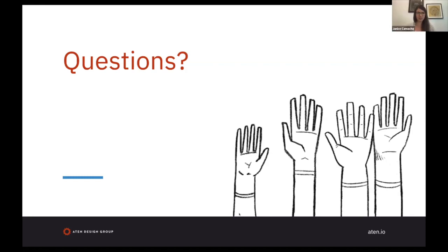Yeah, I would just say, what is their role in terms of whatever RACI chart you might have put together? Obviously, if you've requested their feedback and it sounds like they're of importance, that could be an issue. If you knew you needed their final buy-in on design before you can start moving that into front-end theming, that's obviously a problem. You don't want to hear that they really want the entire layout to be different after your dev has already started on front end work. So I think my response as a project manager would be, what is the risk in delaying it 1 or 2 more days to make sure we have that feedback, versus what is the risk of not having that feedback and moving it into development?